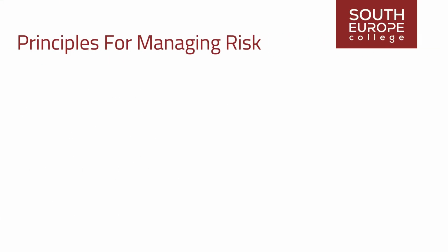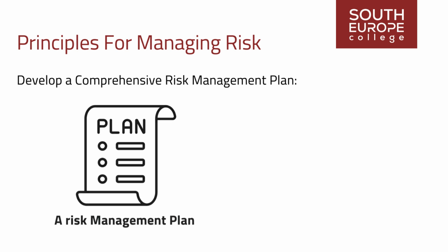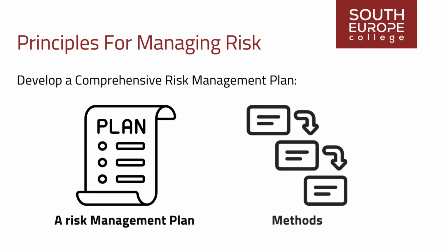The following are general principles for managing risks. Develop a comprehensive risk management plan. Formulate a risk management plan outlining strategies to identify major project risks. Specify individuals responsible for risk management and define methods for allocating time and funds from the risk reserve.